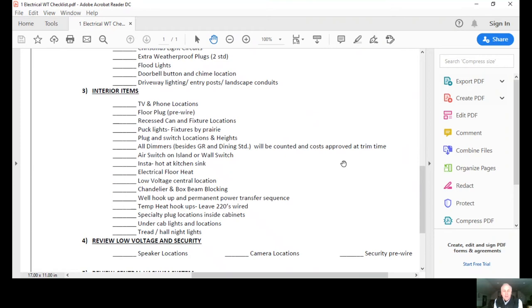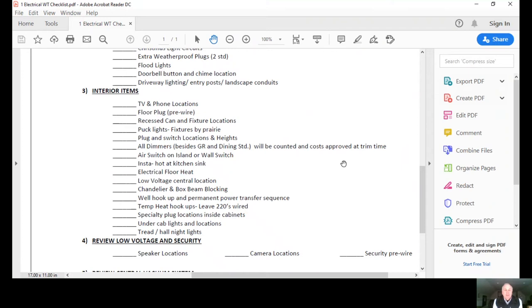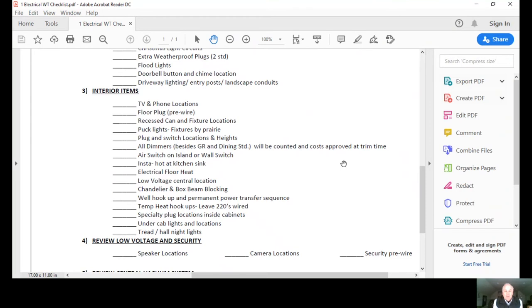Review all the recessed can lights and the fixture locations. Puck lights and fixtures by Prairie, if those are there or another vendor, we make sure we have the list and we're verifying that all the lighting fixtures are there. Plug and switch locations and the heights. Any dimmers that you might want besides the great room and dining room, those are standard.